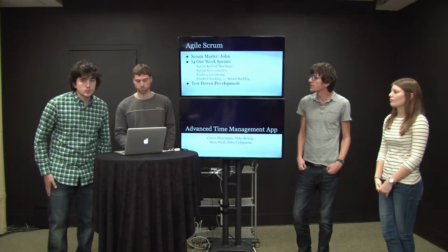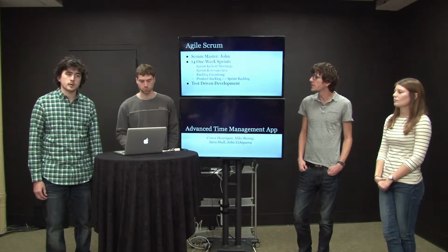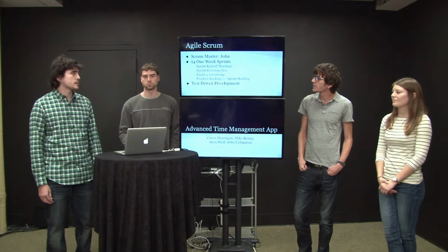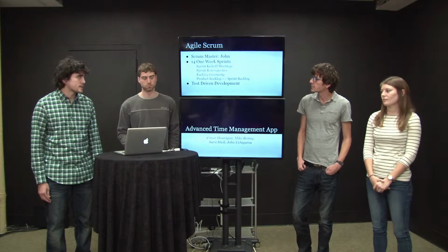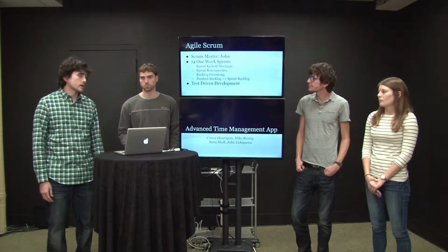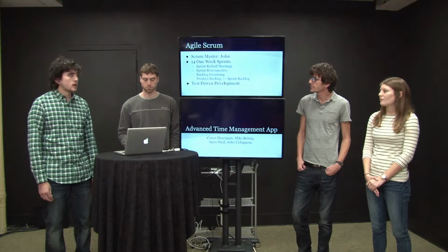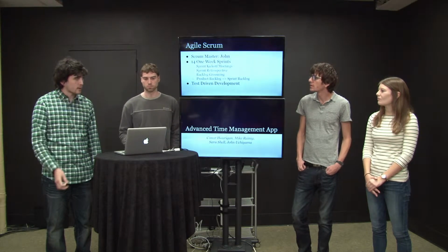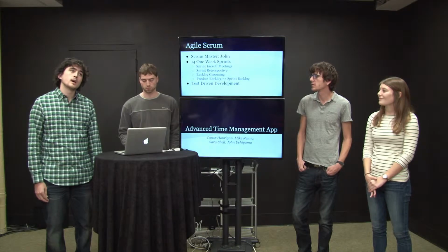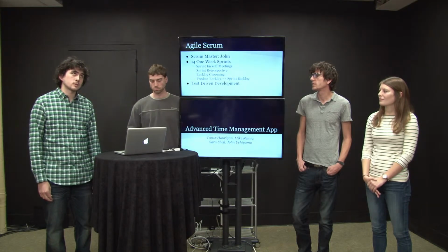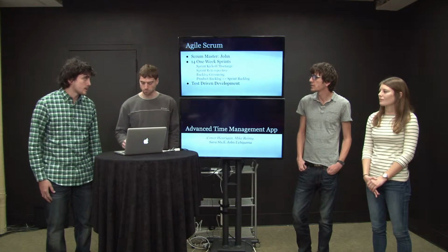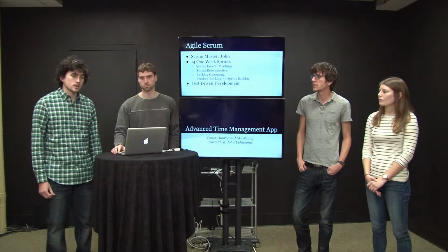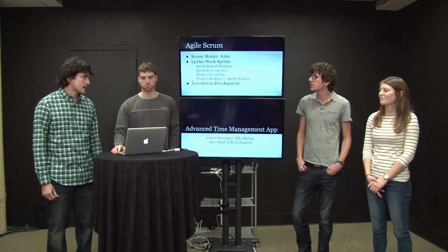In order to get this project done, we'll be using Agile Scrum as our project development methodology. I am the Scrum Master, and we plan on doing 14 one-week sprints, starting off with a sprint kickoff meeting, a sprint retrospective, and then for each week we'll be moving items from the product backlog to the sprint backlog. Throughout each sprint and throughout the process, we'll be trimming the backlog so the best items get on each sprint, and we don't waste our time with things we planned to have before that aren't worth the time now.